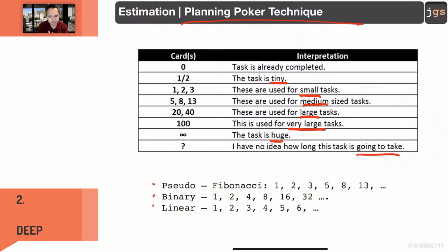Binary is a similar idea, but here you work only with 1, 2, 4, 8, 16. Again, small things, several different levels of small. But when you move to medium or large, it should be something that can be noticed immediately. There is always the option to work linear. It's not recommended. Again, the idea is to really jump the differences.